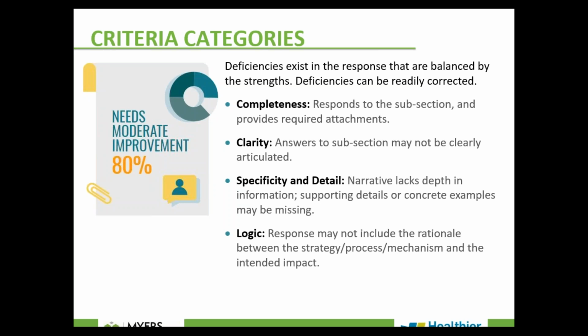So an example that I could give you here, in keeping with the theme of community and stakeholder engagement: there's specificity and evidence about the engagement that has occurred, and you're outlining the detail and the logical steps, and all of the required items have been addressed. But the required discussion of the three key elements of the project is only listed as, for example, bullet points. Information is needed about why these were considered key elements, how they were shaped by community input, and examples of the stakeholders who were involved. So just detail was missing that would have given a score of 80%.